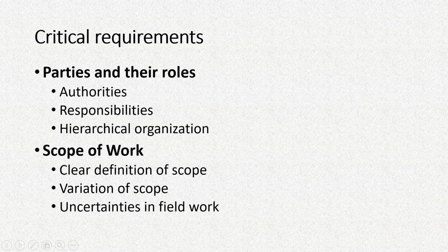Similarly, even in a very simple task like fitting a kitchen sink, is it just fitting the kitchen sink, or also the plumbing work and sealing of joints, waterproofing and all those things? Those are also included in the scope of work. So those things are to be very clearly mentioned.